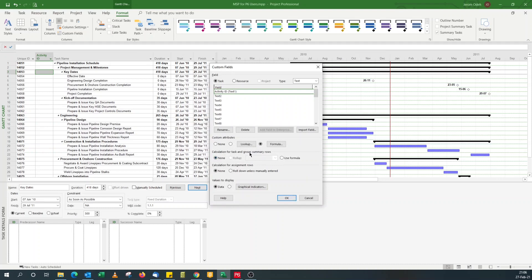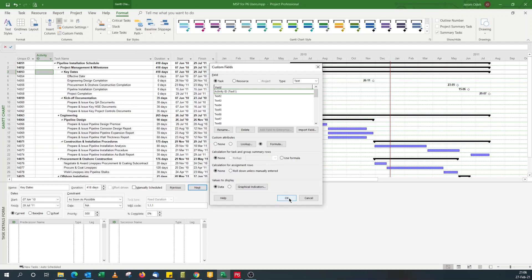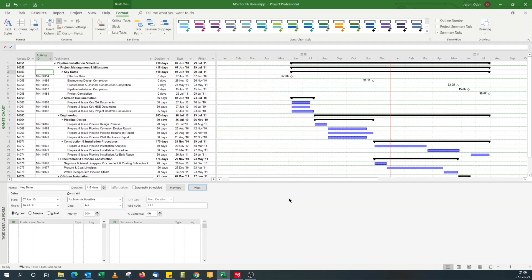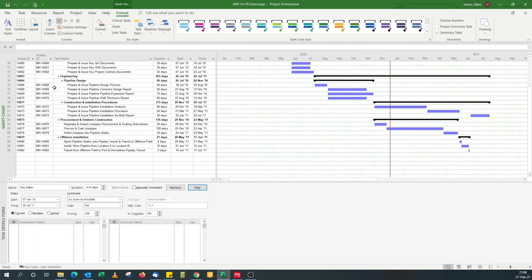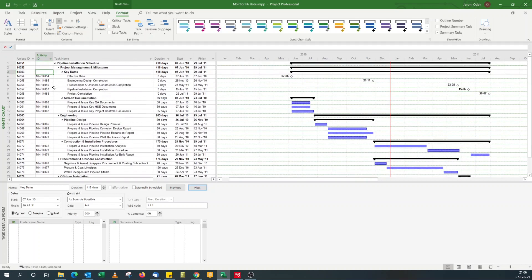You'll notice I've not used formula for summary rows because I don't want my summary activities to have activity ID. In P6, they don't. Microsoft is one of the quirks of Microsoft projects with summary rows treated as activity. So we don't want that. So I'll click OK. And you can see activity IDs are displayed.